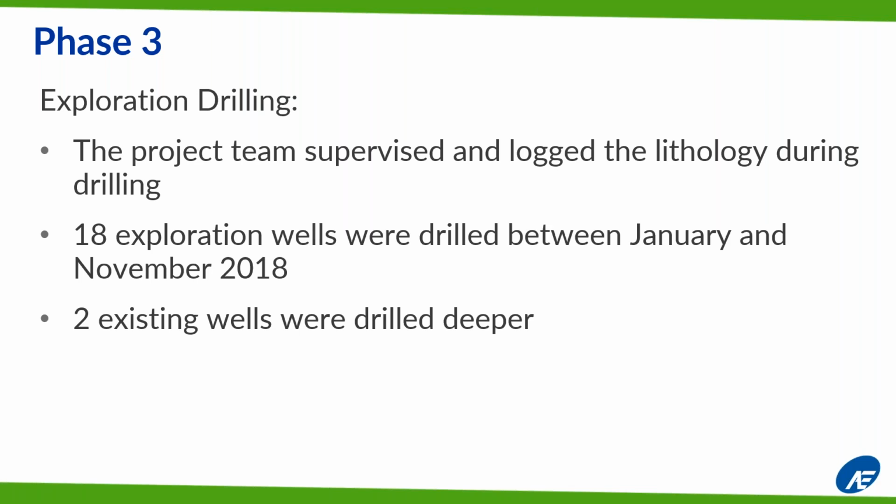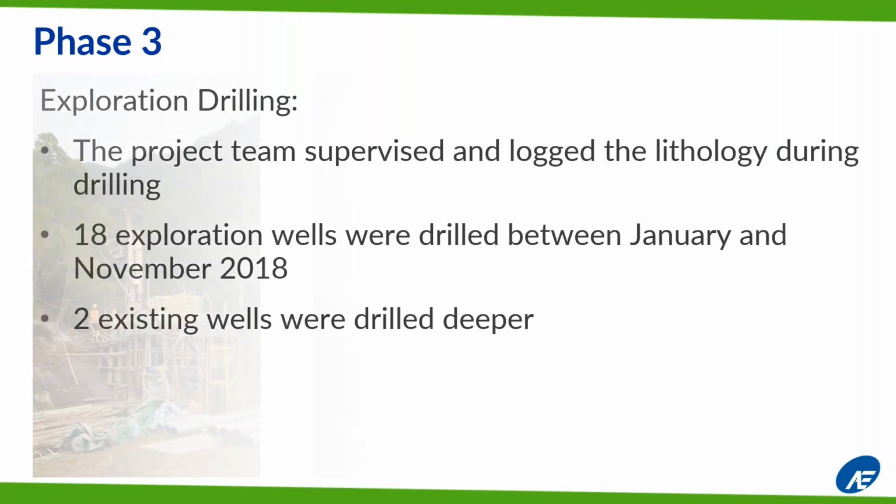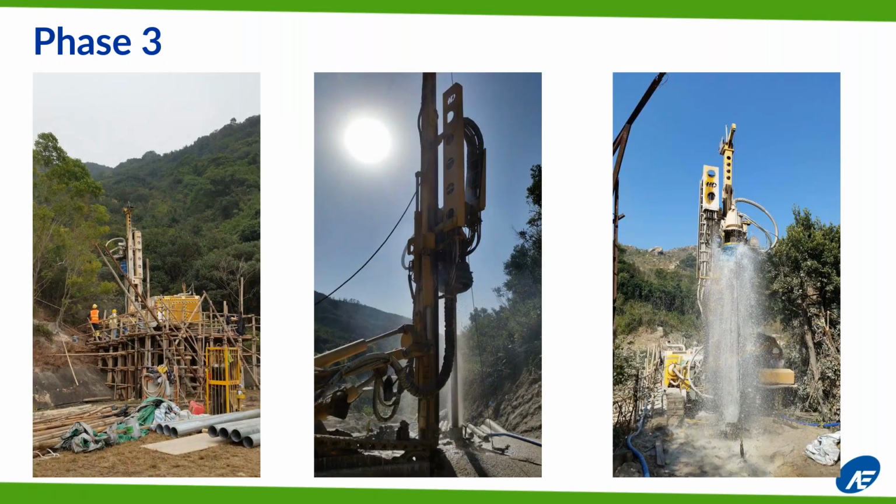Our team was over there. We supervised the drilling and logged the lithology. We drilled 18 exploration wells between January and November of 2018. To save costs, we actually deepened 2 other wells that were already existing at the site. Just a couple photos of the drilling process.